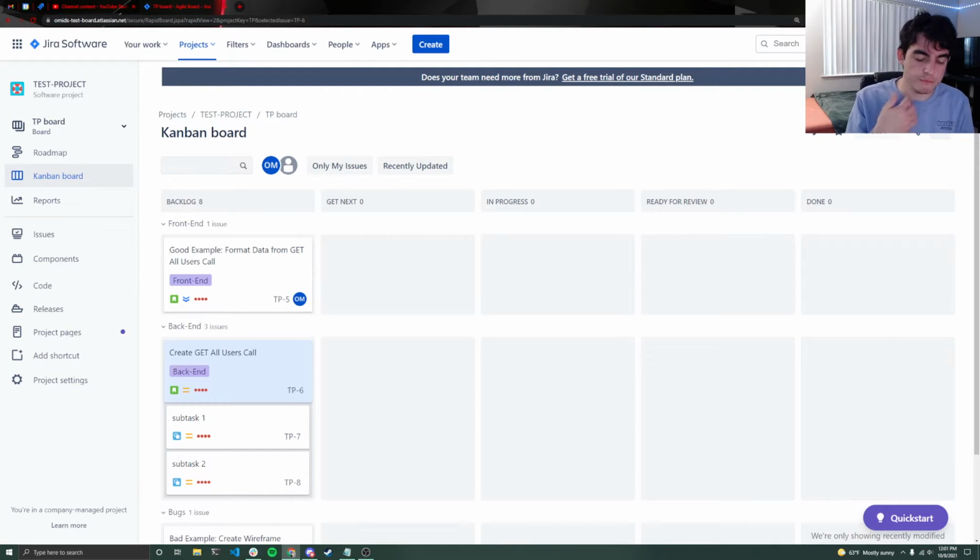And then what you fail to realize is that there's several big subtasks underneath that. Like you might need to create a few extra database calls, a few extra queries, stuff like that, that might add to that time and suddenly double or even triple how long that user story takes. And this can cause a few negative effects. The biggest one, obviously, time slowdown. You can't get everything that you thought was going to be getting done in that sprint done for that week, and now that's going to be negatively affecting all of your other weeks.